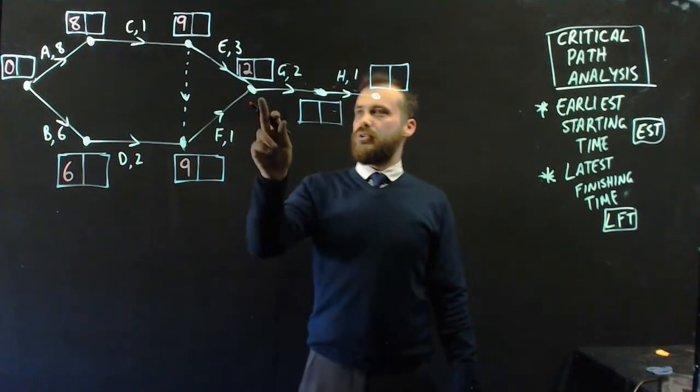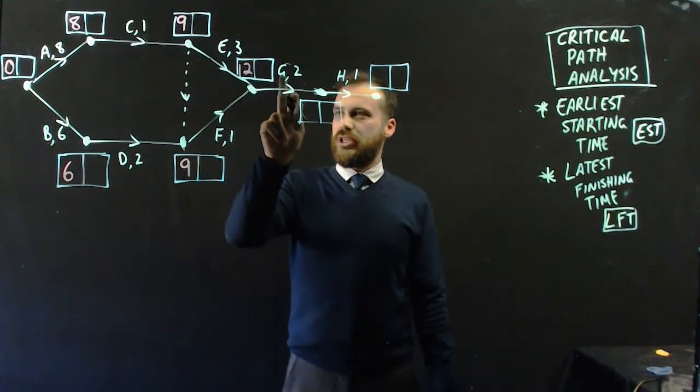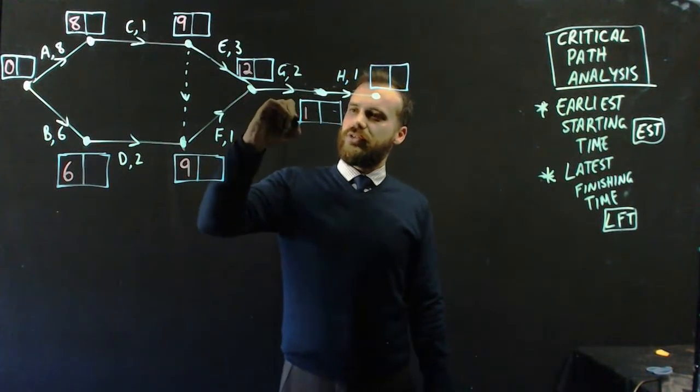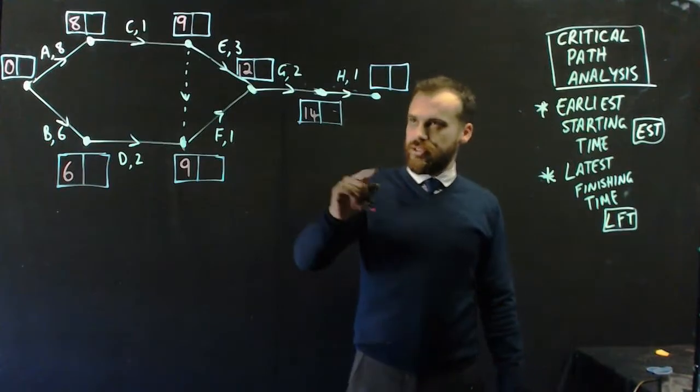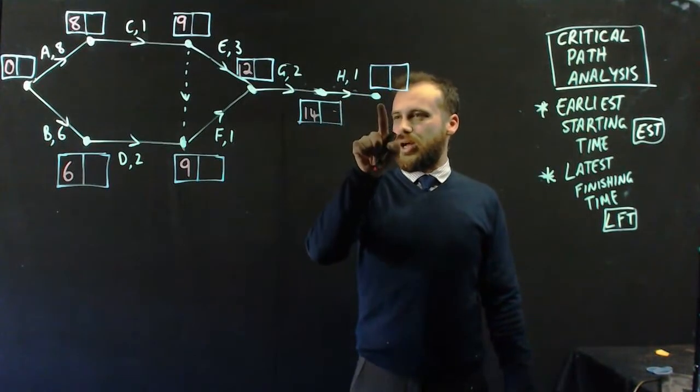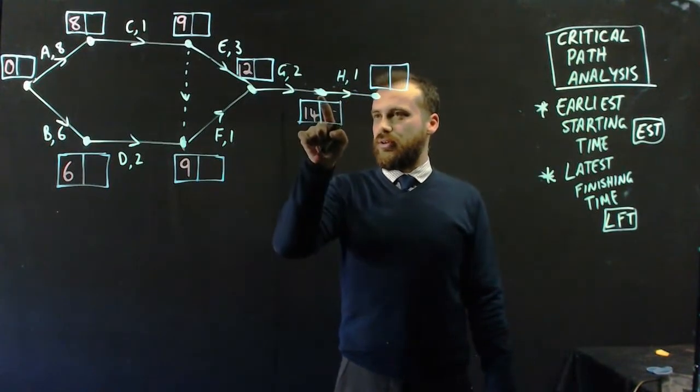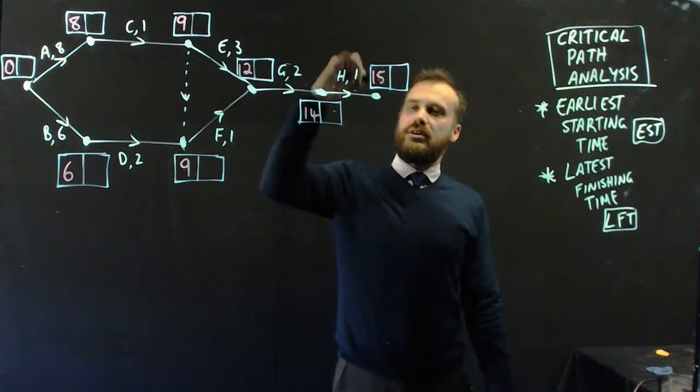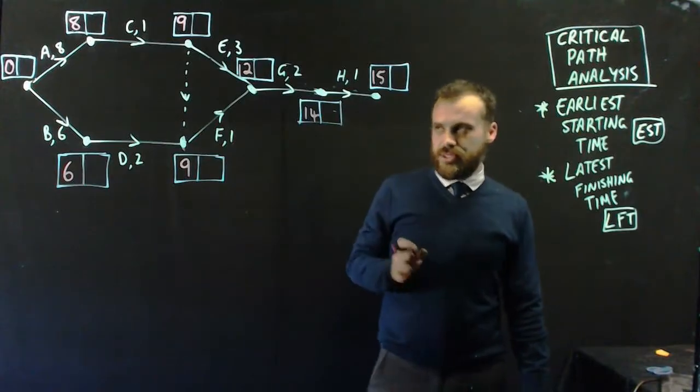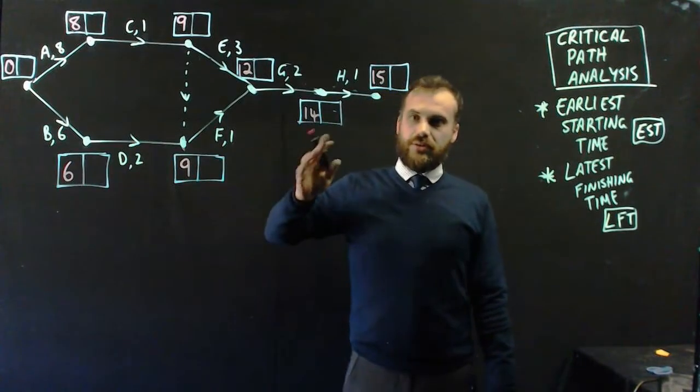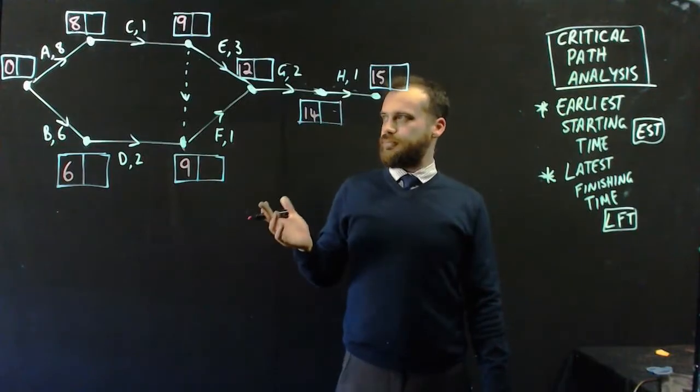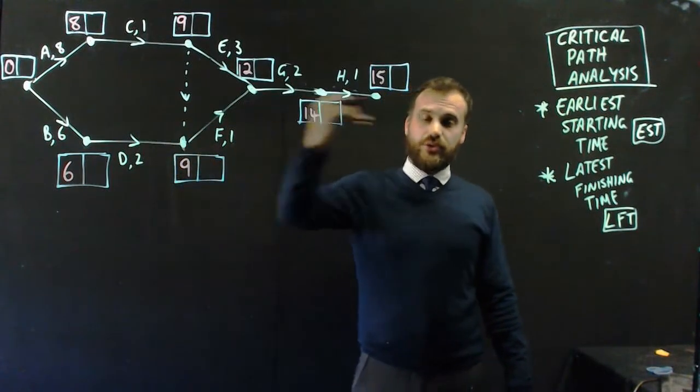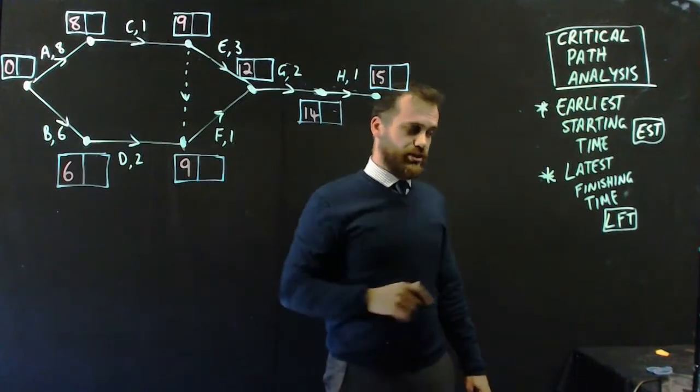From here, it's going to be really straightforward. H can't start until G has finished. It took twelve hours to start G. G took two hours. So that's fourteen. And finally, it takes one hour to do H. H can't start until this has happened, which took fourteen hours. So it's going to take fifteen full hours to finish this activity. Whatever it is. That is forward scanning. I scanned forward through the network to find the earliest starting times.